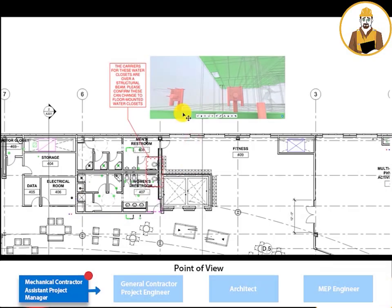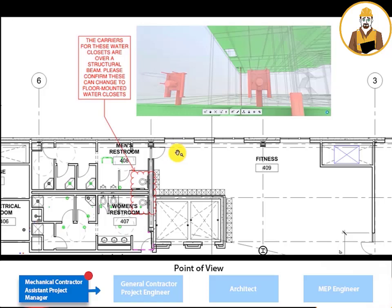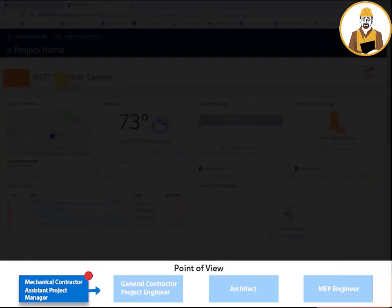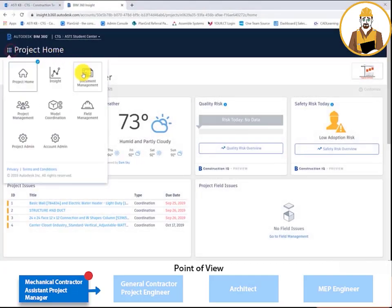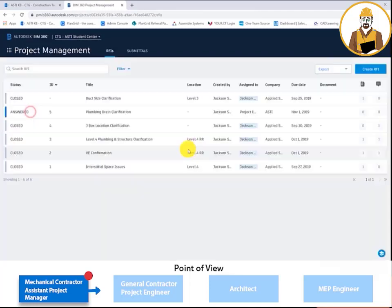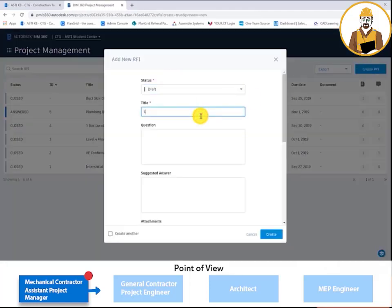The assistant project manager has the detailer's markup open on his screen. In BIM 360, the assistant project manager opens up the project management module and creates a new RFI. In this dialog, you can create a title, a question, a suggested answer for the RFI.